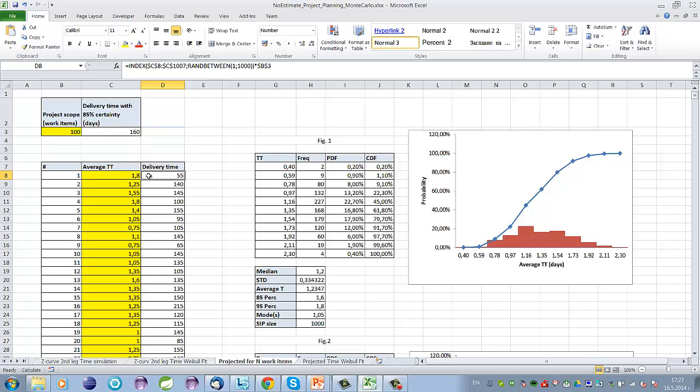Again here we will put just a simple table, and we use the INDEX function and the RANDBETWEEN function. So for every entry in column C, we will be randomly generating a position, taking the value for the generated position, and multiplying the value by B3.